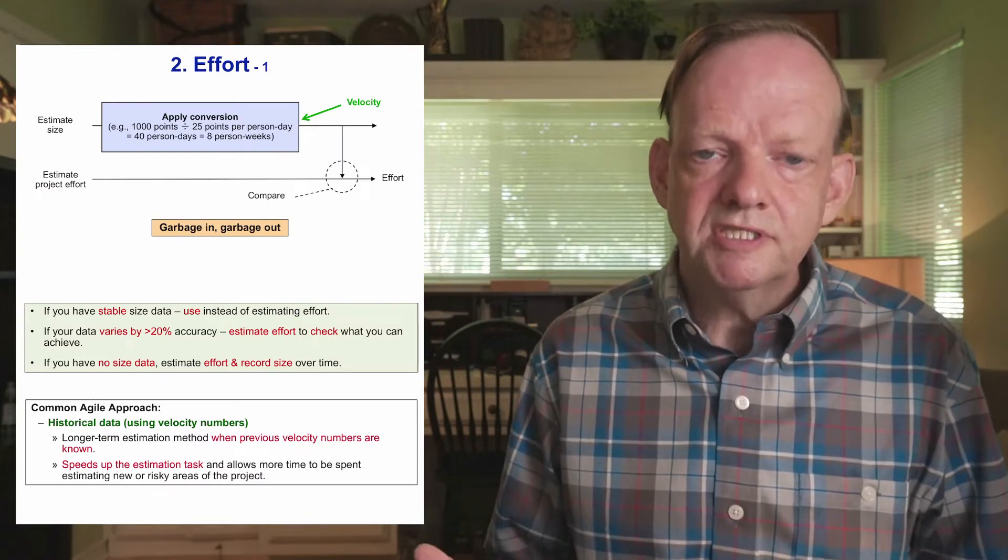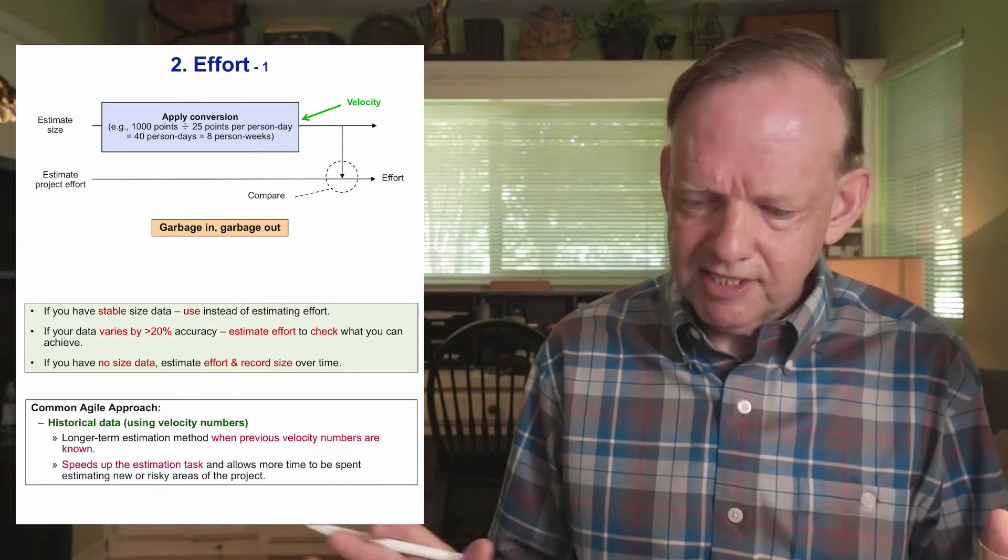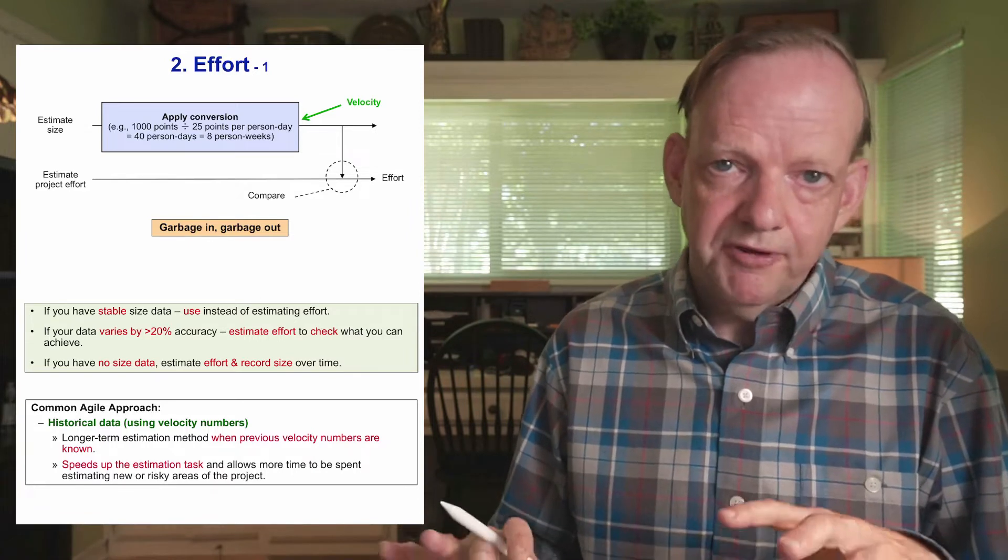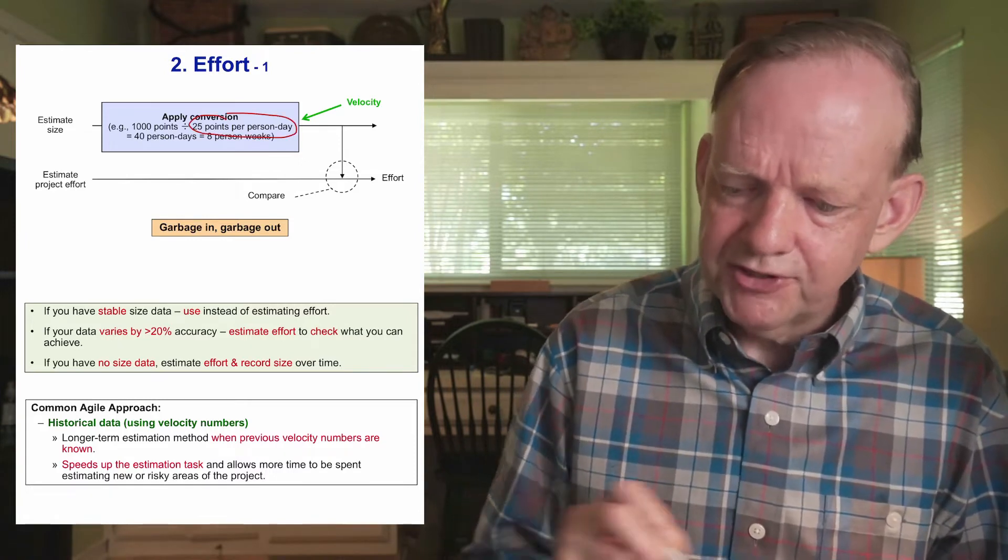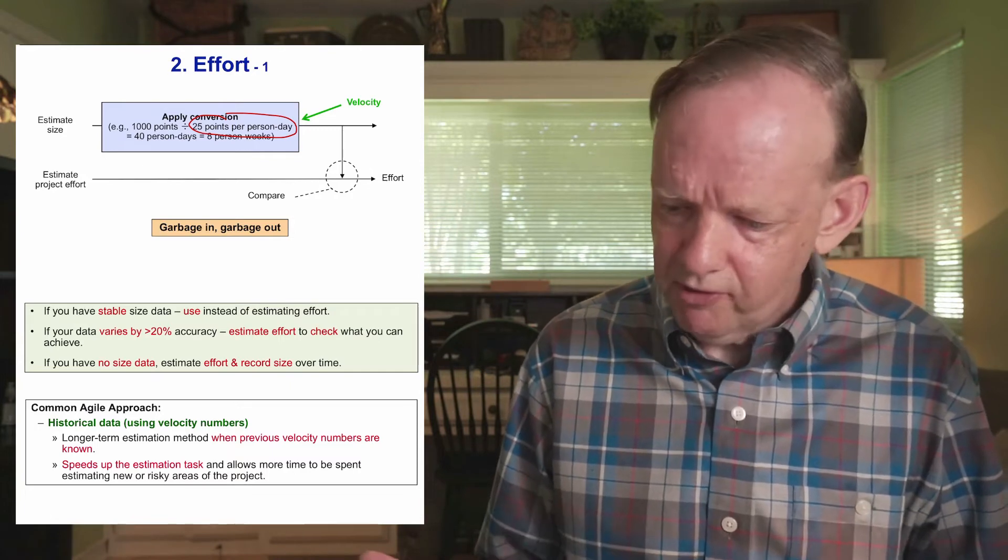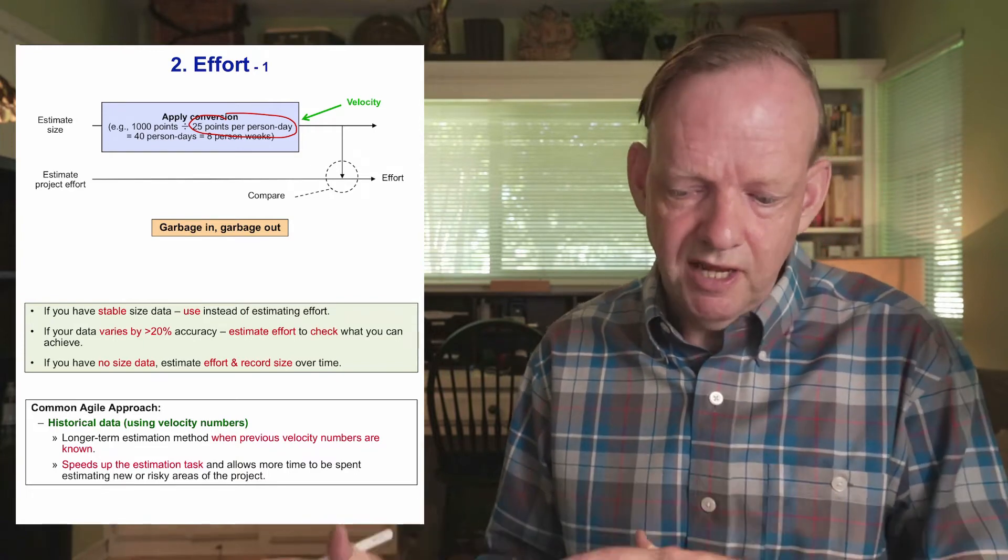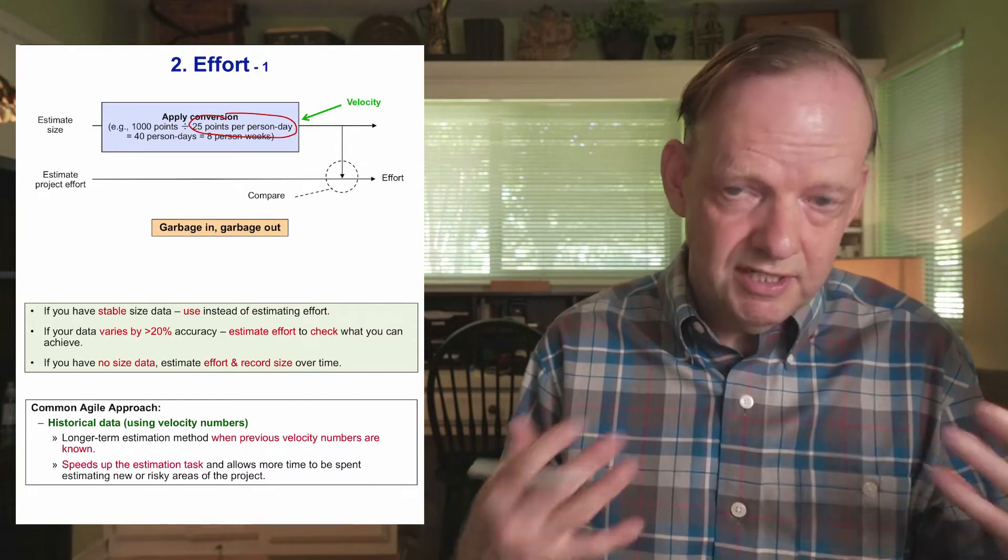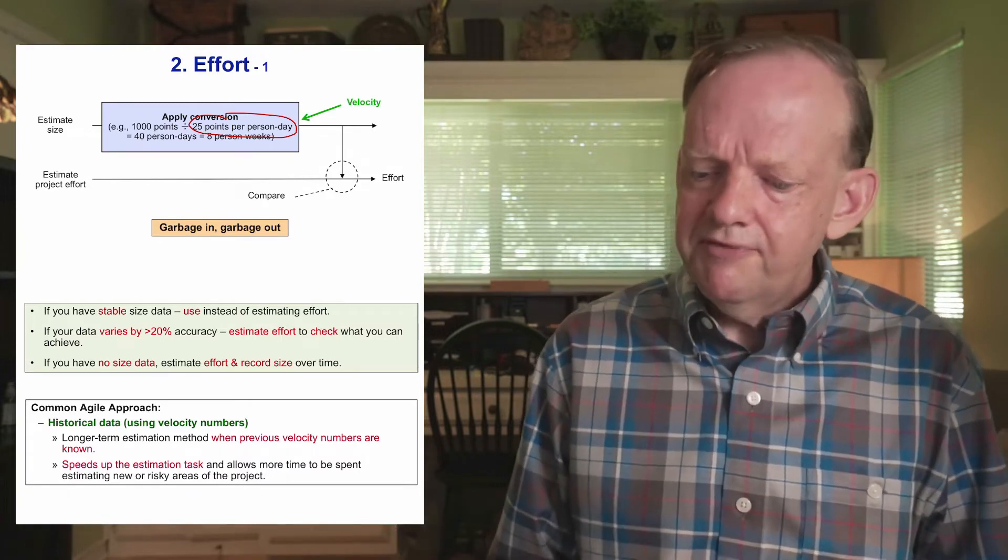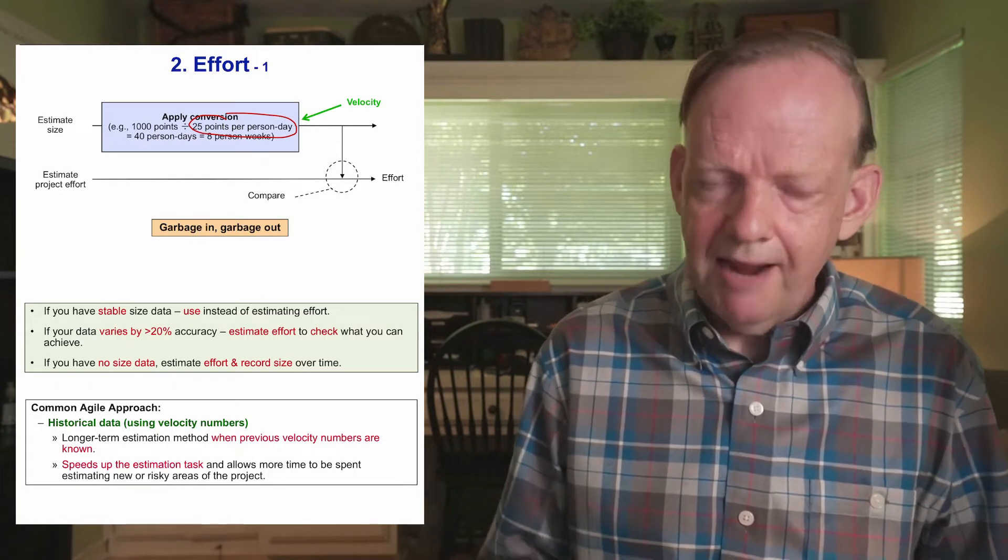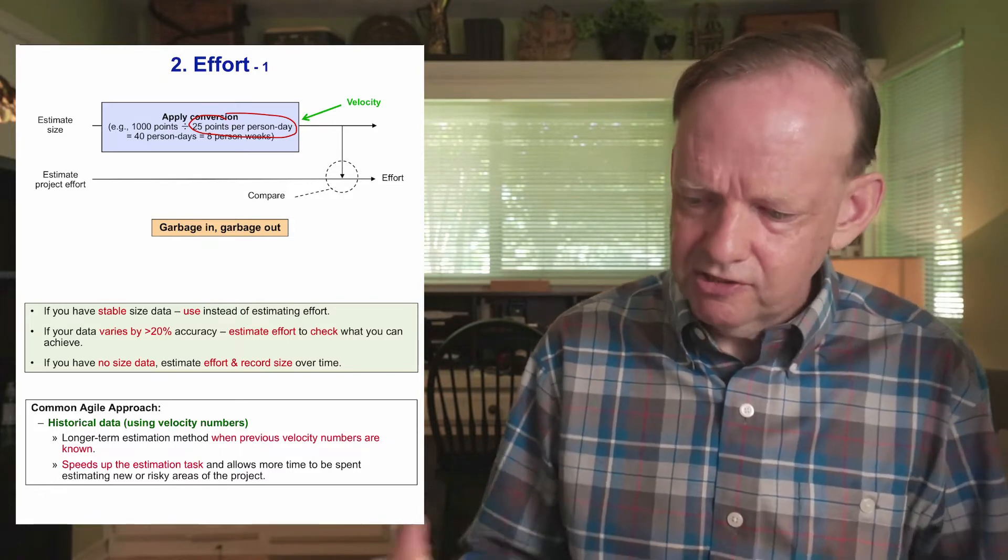The next step is to derive effort. Effort would mean billable hours or labor or uninterrupted effort or ideal time. The idea of starting with a Fibonacci series or story point series and then a velocity is you can take the velocity and figure out the likely duration. If we had a project or backlog of a thousand points and we knew that our team could do 25 points per person per day, then we can take that number using an average velocity and come up with a rough idea of person days and person weeks. If you have good velocity data, like how many points per week a team member can do, then you can do a quick calculation and get a quick prediction of the likely effort at the end.